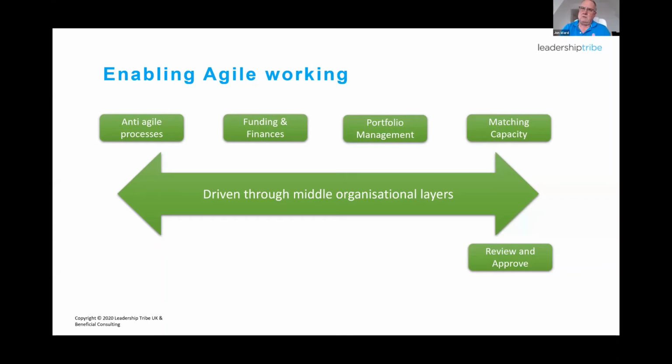Does the team need to have a monthly steering meeting? No. If it's green, why do we need to steer? If it's in amber status, you bet. And if it's in a red status, maybe add a steering meeting once a day. All of us have been in those 9 o'clock calls to talk about the XYZ project. So these are all examples of adaptive governance, and we might need to think about that.